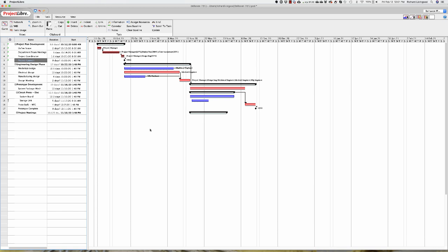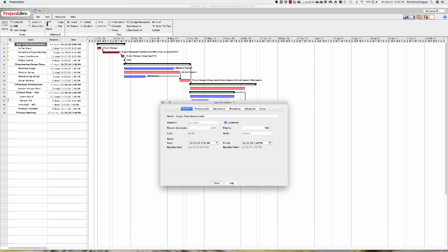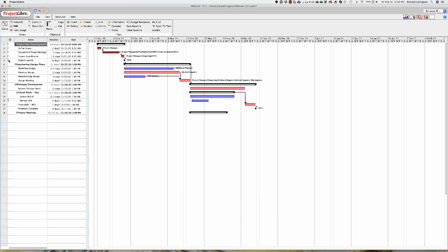milestone. Now, notice that all 3 of the tasks have a bar through them. And just for fun, let's see what happens. You'll notice that by default, project plan development, which is a summary task, is now 100% complete. Also notice the little tick marks off to the left showing that the project is complete. By hovering over one of those little green tick marks, it says the task was completed and when it was completed. So we have several indications that this project is done.